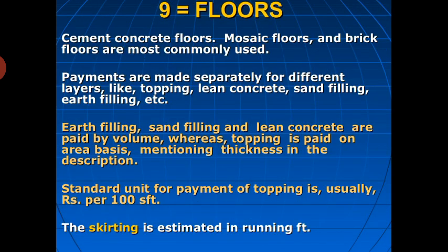Of course, floors, cement concrete floors, mosaic floors, and brick floors are most commonly used. So payments are made separately on different layers like topping, lean concrete, sand filling, earth filling. They are all separate. We have to do it. It's not only